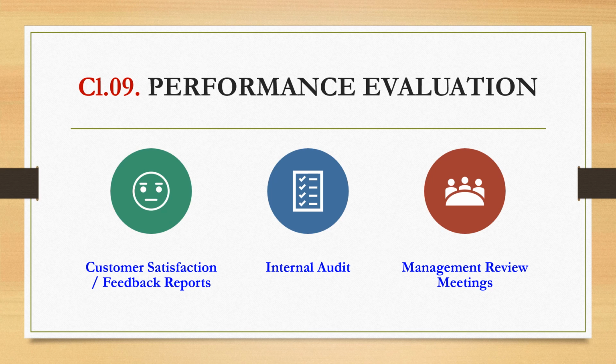Clause 9 Performance Evaluation. Once the planned things are executed, it is important to evaluate the performance of product quality, whether it conforms to the requirements, customer satisfaction, organization objectives, and also whether the processes involved are effective. So we will focus on customer satisfaction reports, internal audits, and management review meetings in this clause. Customer satisfaction reports will be obtained once the customers take possession of flats. Their scope of improvement points will be noted and action will be taken based on this.